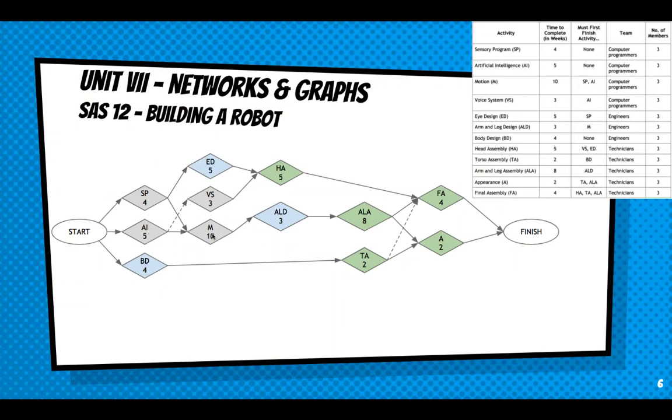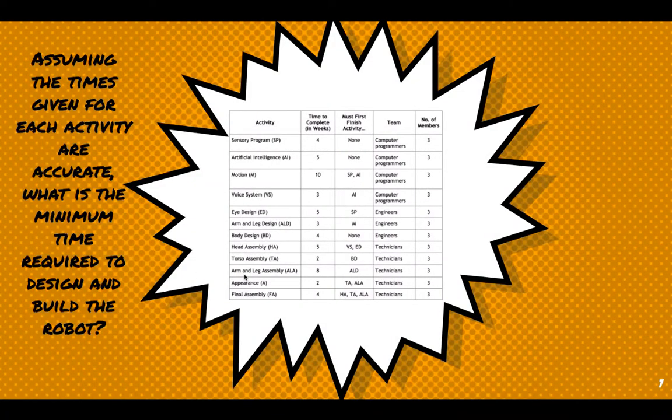So that's longer than the 29 we determined going this way. So artificial intelligence, motion, arm and leg design, arm and leg assembly, and final assembly is going to be 30. If we go this way, it's only going to be 28. So we know that's not the longest time. So that's all of the AI pathways we could take. Let's try through the body design. So body design is 4. Torso assembly is 2. That's 6. Final assembly is 4. That's 10. Obviously not the longest because that goes on to finish. And it's even shorter going this way. It's only 8. So the longest pathway is arm and leg design, or I'm sorry, artificial intelligence, motion, arm and leg design, arm and leg assembly, and then final assembly, which is a total of 30. And that would be your answer to this question.